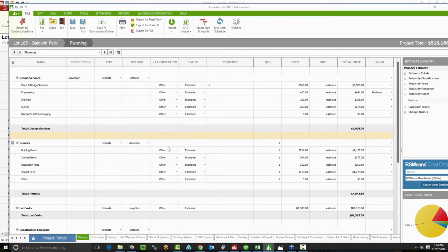Now, every three months, I believe, every quarter, RS Means sends us updated information, which we release to all of our Total Care members. All of you get updated cost books every quarter, and that pricing information is good everywhere across North America, from what I can remember. It's got a little multiplier available to you in the top right corner. You can find a way to adjust the pricing and the detail and everything like that for your region.